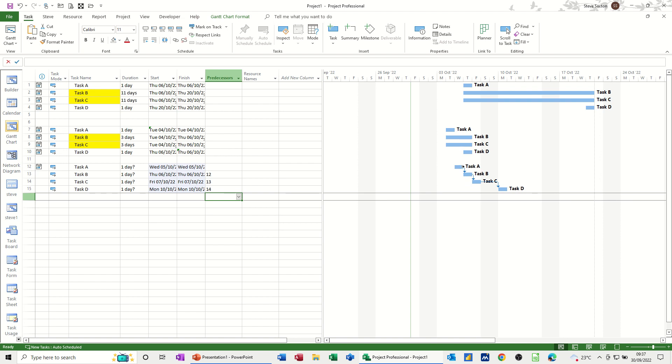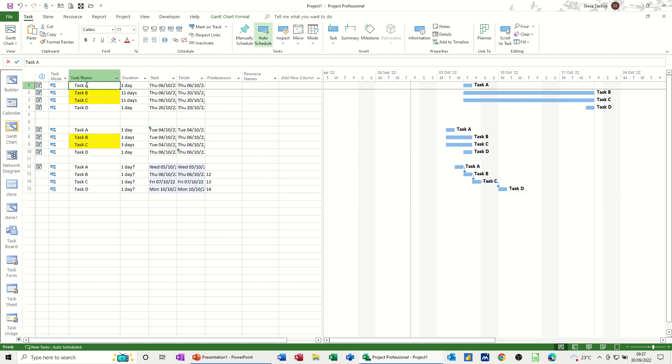It's not always possible to relate things or link things. These could be just loose tasks sitting in. That could be just a phase that you're going through. It could even be a milestone. And then these are tasks that need to be done, but not in any particular order. And that's what a hammock task is.